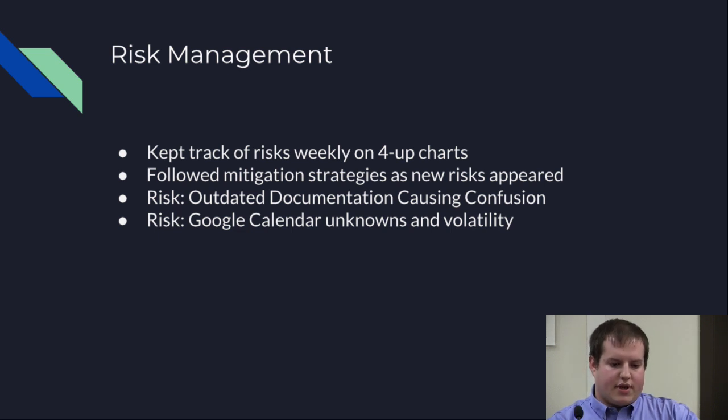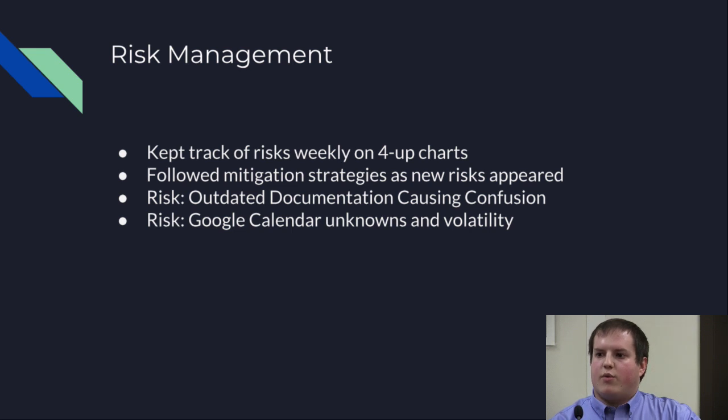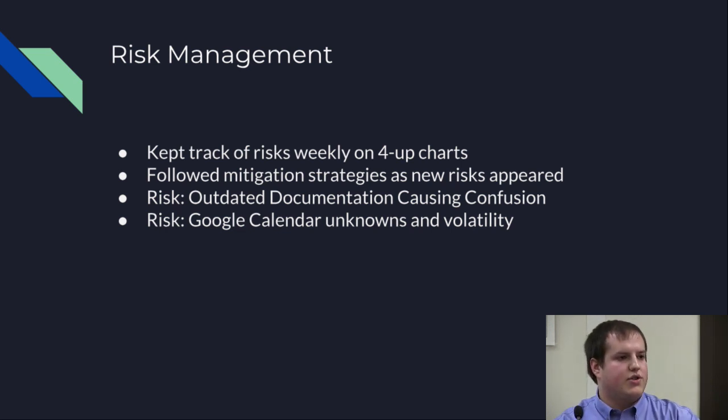Looking at a couple examples, one being outdated documentation causing confusion. If this was to happen, it could cause some confusion with the sponsor and the coach if they were to view our project artifacts without them being actively updated. They could see some discrepancies regarding decisions that were made during meetings and things of that nature. To mitigate this, we set aside time within our weekly team meetings to update this documentation when needed.